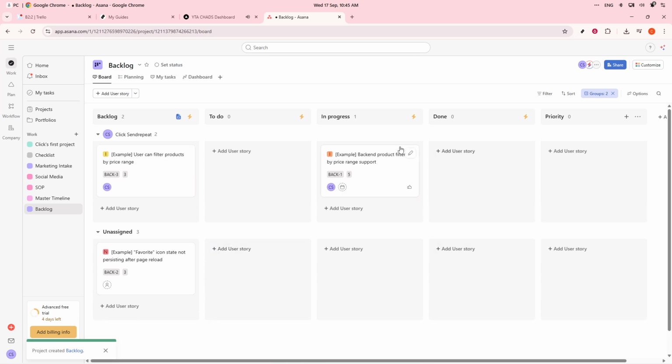Managing your sprint workflow effectively will ensure smooth operations. Assign tasks to team members, ensuring due dates align with sprint durations, typically about 1 to 2 weeks. If tasks require more detailed breakdowns, consider using subtasks and track any dependencies, like ensuring the API is finished before UI development begins. Lastly, tracking progress using Asana's timeline and reporting features is vital.